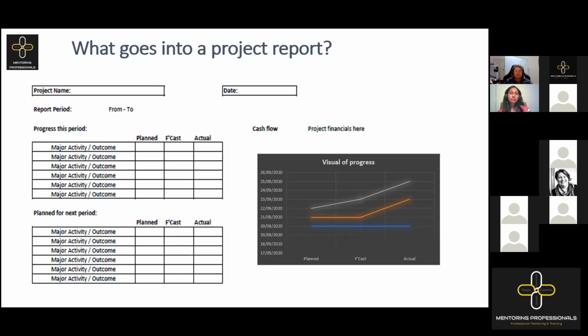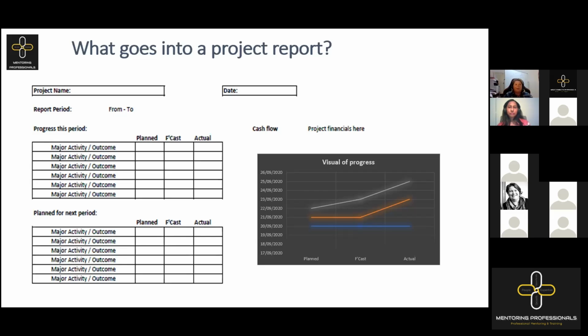But they're not just going to audit and say, are you actually doing what you said you're going to be doing in your PID? They're actually going to be looking at your PID and saying, are you actually working in alignment with that corporate level governance? Are you doing what the book says you should be doing, how you should be doing it? So that is in fact a project assurance role. And if it's coming from the program into a project, it's a quality assurance. It's talking about process, the quality of the processes that you are in fact following.